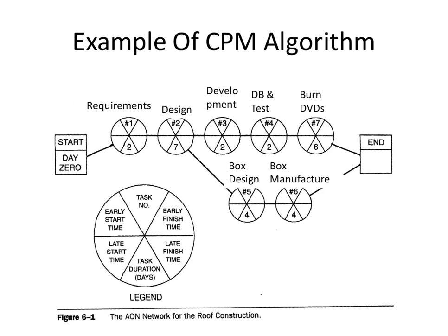19. Why not 17? Yeah, so 17 could finish up early, but we're depending on the critical path, the thing that takes the longest. That's 19. We can't finish the whole project until everything's done. So we can't finish the whole project until this top one is done. So that's great. So, ladies and gentlemen, recall in the backward pass, what things are we filling in? Late start and late finish. So we're going to go back now and fill those in.